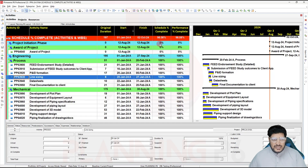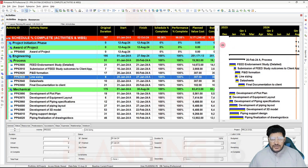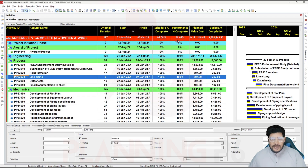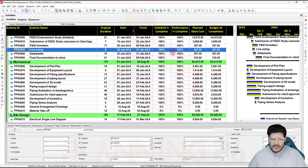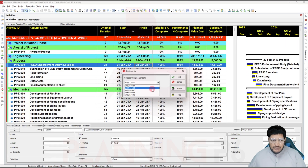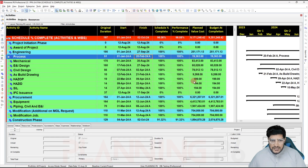After recalculating, go to the Activities. You can now see the Planned Value Cost is shown and Budget at Completion is also shown for both. For performance, it uses Actual Value, Earned Value cost, and total budget cost. You can now see the performance percent complete and schedule percent complete, planned value cost, and earned value cost are showing for the entire schedule. If I collapse to WBS level — for example, Level 3 — you can see the values are rolling up to the WBS level.